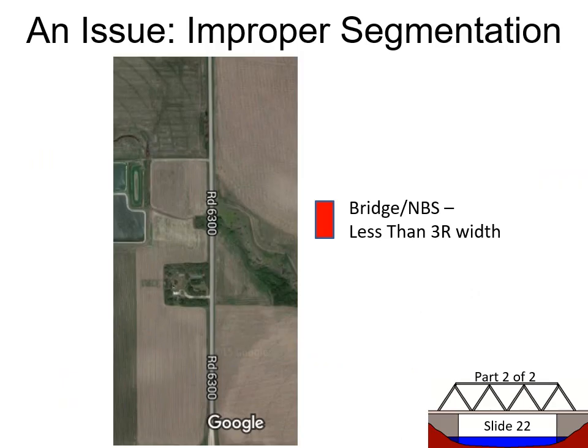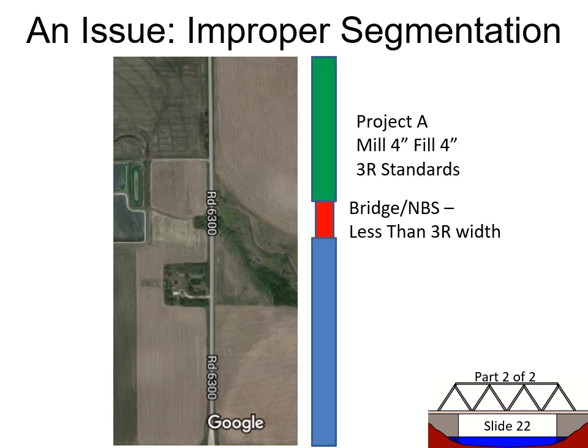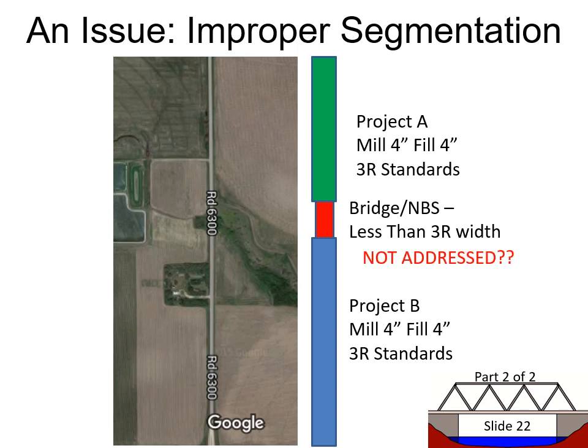An important issue that is addressed by notes 6, 18, and 22 is segmentation, that is, doing projects up to a structure or just short of a structure and not addressing the structure itself. Thus, the structure is not updated to standards as it needs to be.